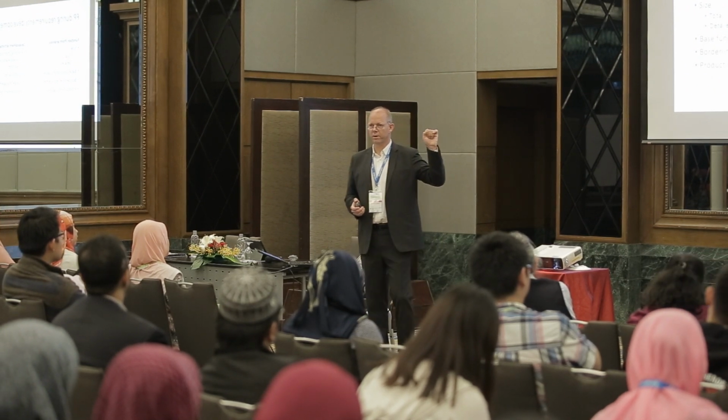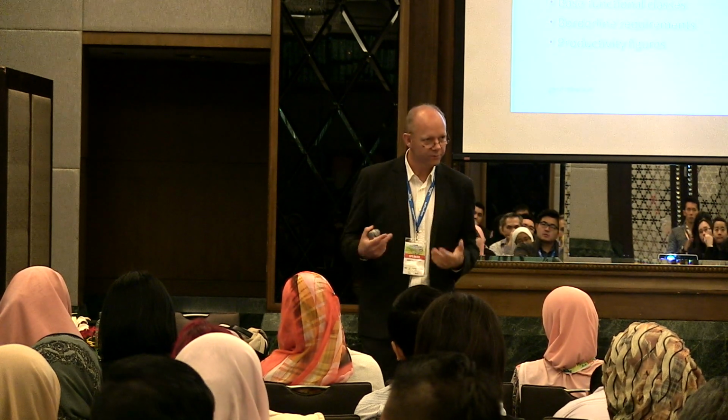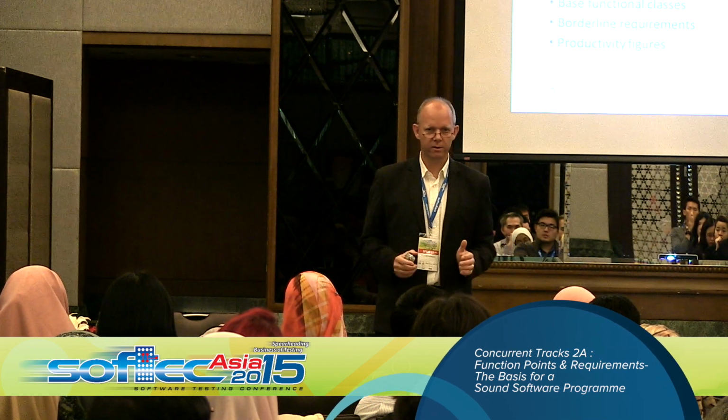When you're looking at function points, you're looking at base functional classes. Each of these relates pretty nicely to some functional tests, because for each class there will be some functional test that you have to perform, or at least consider. You will also find during this some borderline requirements which you can use for your change management. Is this inside versus outside, and how much is it? The whole classical discussion that you will get more information about.